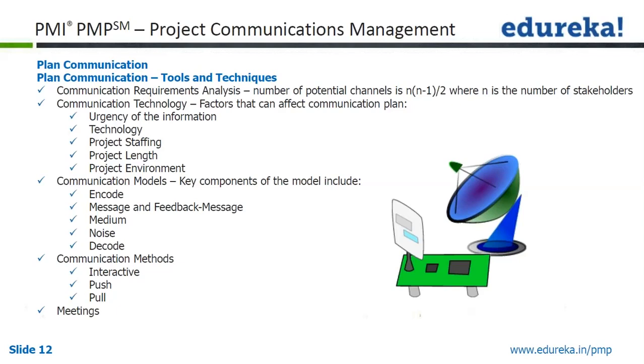These requirements are defined, and project resources should be expended only on communicating information that contributes to the success of the project, or where a lack of communication can lead to failure.